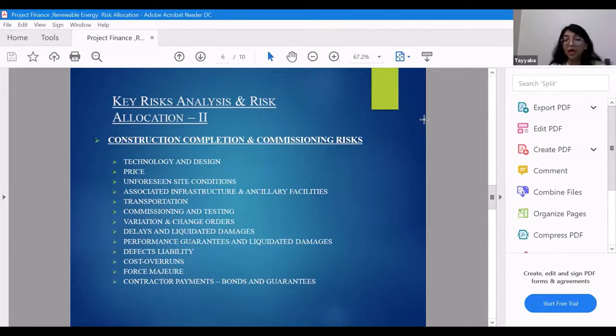So that's a risk, and how do you cover that risk? That's the question. Force majeure risks are usually covered in contracts by way of allowing extension. So contracts take care of them. The legal rights related to force majeure of all parties can be invoked. I understand it's all jargon, and I'm not sure how much you're following me. But legal rights are there in agreements in relation to force majeure, so parties can invoke their legal rights if they are faced with force majeure.